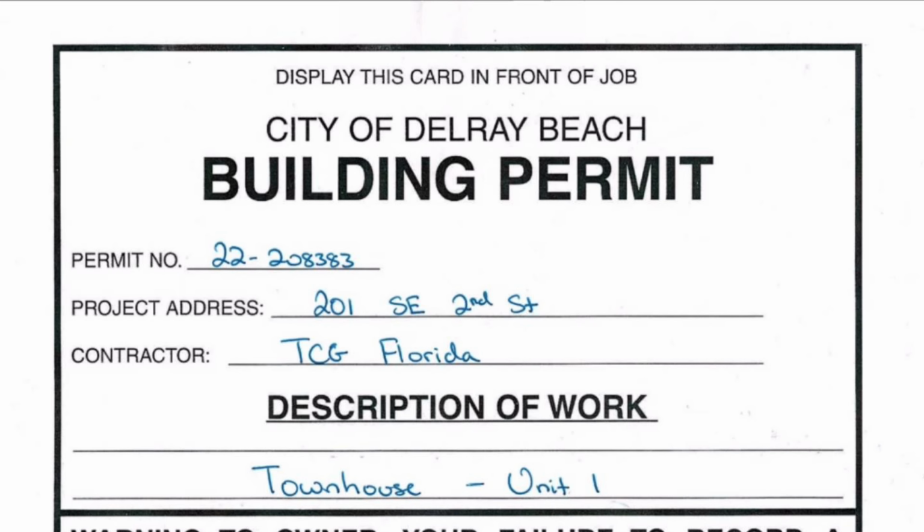The cost of the permits was staggeringly jaw-dropping. We budgeted around $80,000 based on historical reference, but with all the BS impact fees, the permits come out $40,000 over budget at nearly $120,000. So a little bit of a sticker shock there, and our contingency fund took a little bit of a hammering.